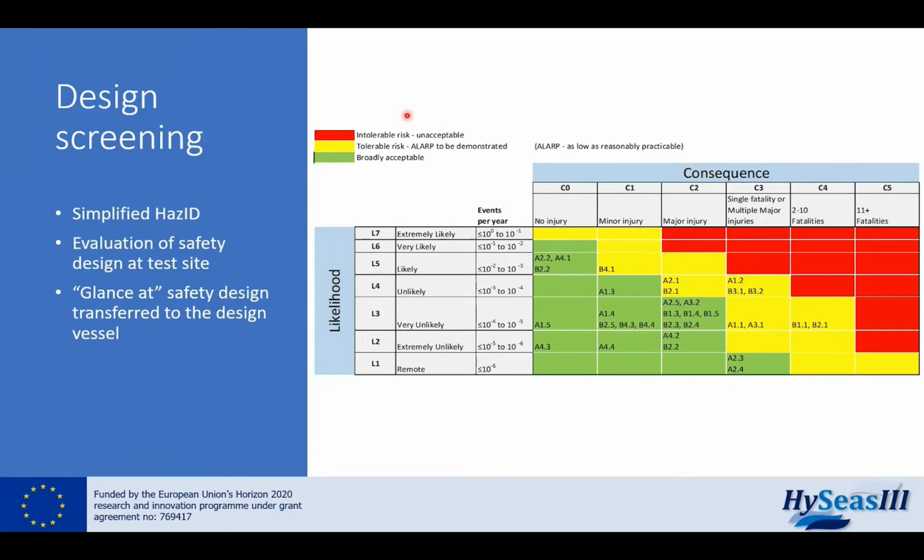After completing the safety design, we had a design screening, or a simplified hazard identification. This is to ensure objectivity in the evaluation. This session was hosted by a third party. The main focus in this screening was, of course, the test site, but we also took a glance at how the design would apply to rules and regulations for a vessel.